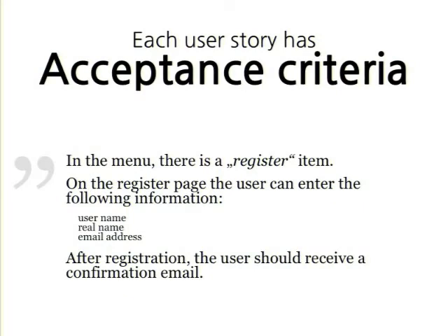So if the story has been implemented by the development team during the phase of development, then you can take these acceptance criteria, and if all criteria are met by the product that stands at the end of the sprint, I'll go a bit more into detail on that next, then you can say that this story has been successfully implemented, or, long story short, is done.